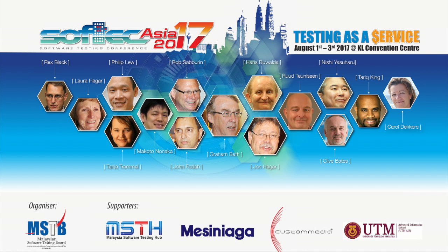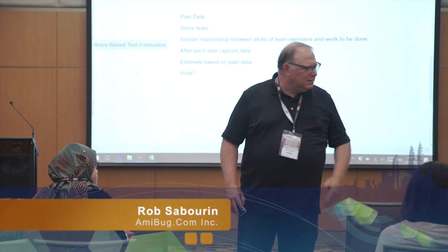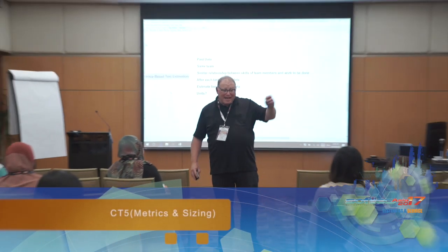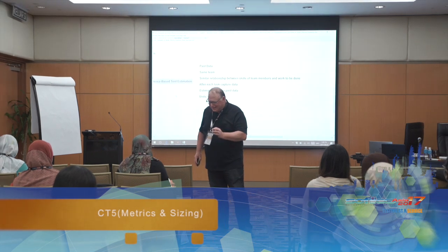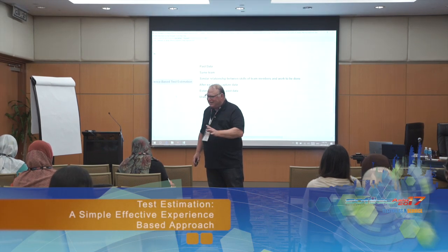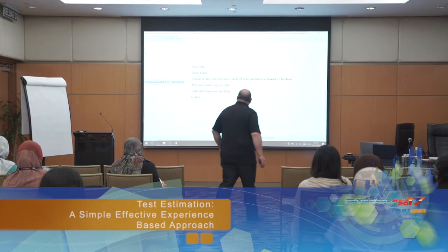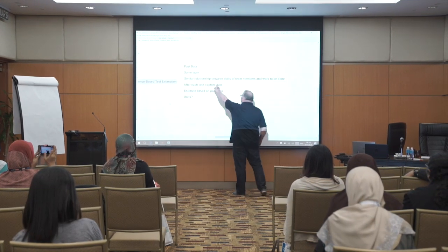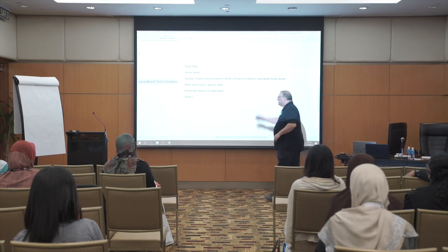I collect data. If I'm doing an Agile team, it's the Scrum Master's job to collect the data. If it's waterfall, it's the test lead's job to collect the data. But I want to collect the data after a task is done, not before the task is done. And the data I'm going to collect, I'm going to show in a minute. So I'm going to collect data every time you do a task.